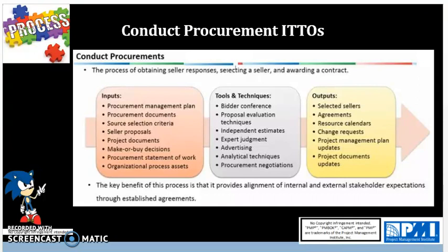You're going to use that in all types of procurements, whether it be complex or not. You're going to look at source selection criteria. It will be based on seller response to the RFP document and previously defined weighted criteria. It is a formal evaluation review process which will be defined by the buyer's procurement policies, and the buyer's side evaluation committee makes a selection based on evaluation criteria for approval before awarding a contract.